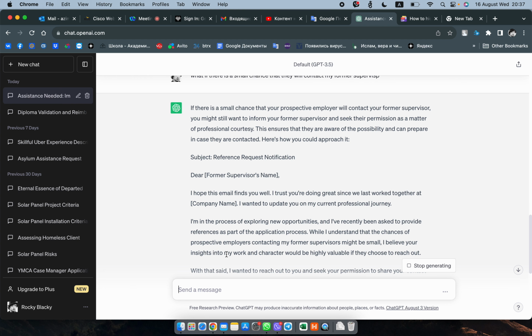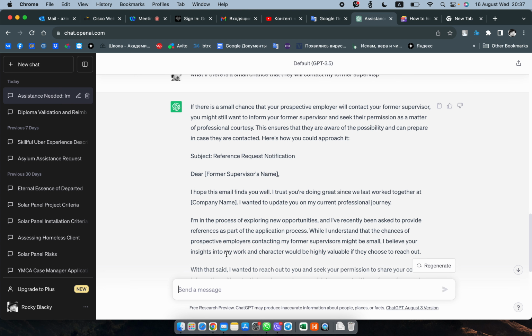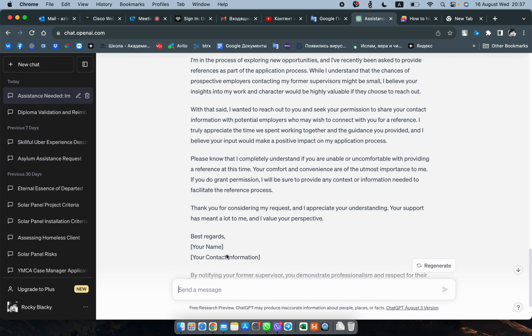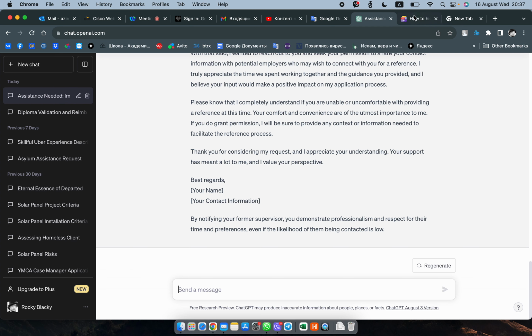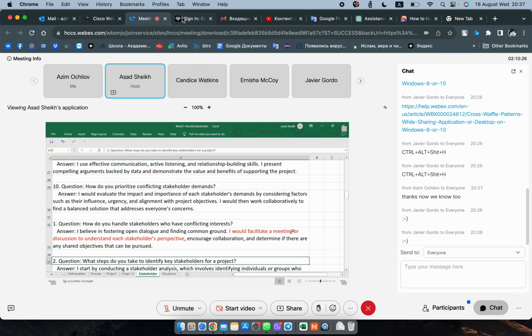We just can't add on. There's no change control here. You just do in the time box of 2 to 4 weeks whatever you pick up from the backlog. You pick up the user stories, you go through them, and then you stop. If they come up with new ideas, those ideas will go back into the backlog for the next sprint because you don't have time.